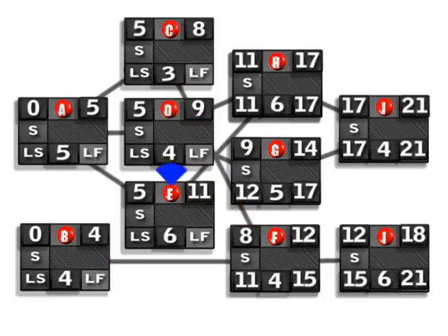E. Activity E, we have one arrow. Okay, you see where it comes backwards here? So we're going to take 11 and transfer it down here. We don't have to make a decision. We know it's going to be 11. 11 minus 6 is 5.